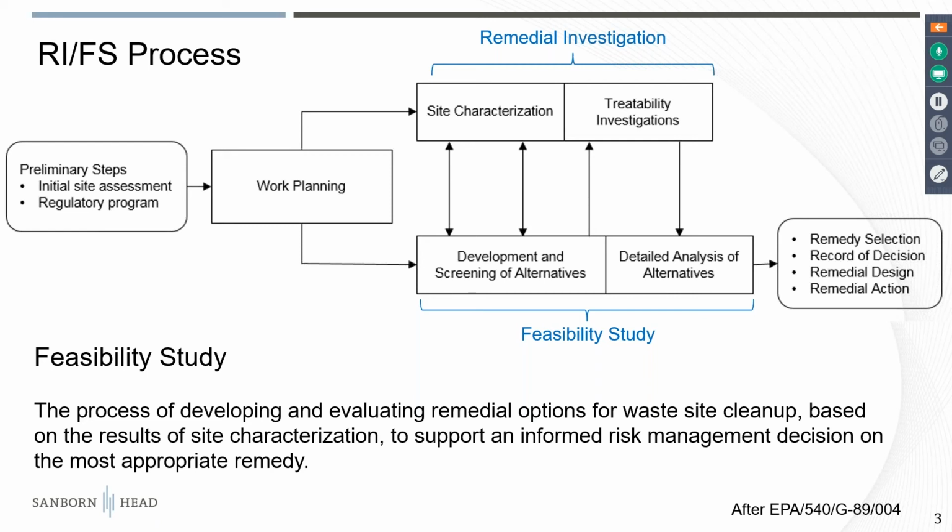And then the process kind of splits into two parallel paths. The remedial investigation phase on the top and the feasibility study phase on the bottom. And I think it's interesting that it's put together this way, in that a lot of the work that goes on in the remedial investigation feeds into the feasibility study, so that it's not necessarily linear. You finish the site characterization, you move on to the feasibility study. Many times it's important to have information coming in from your site investigation, your site characterization, to help inform the technologies you're evaluating as part of the feasibility study.